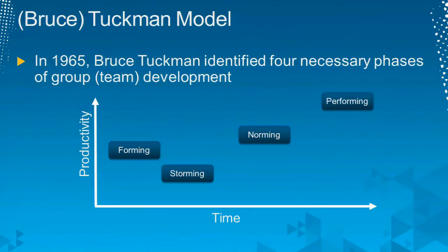And then I actually made a 5th one. I blogged about it a while back. It was kind of silly, called swarming. Because in Scrum, as a team, you might take on several commitments for a sprint. We're going to do the Twitter thing, we're also going to fix this bug, and we're also going to give you this management report. What you want to do is get that high priority one done first before you go to the next one. So a performing team will actually swarm on the problem that's high priority 1 before they go on to high priority 2. But at performing, that's fine too. If we stop at performing, I'm happy with that.